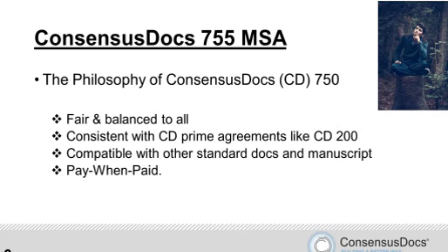And as a standard document, like the 750 and the 751 short form, the document is pay when paid, and that is the standard which we have come to agreement and consensus. I know that there's different views on that type of provision. I know a lot of people feel like there's a pay if paid provision, and that's a tough one, right? And so the bottom line is this is the best practice standard that we put in and publish in our document. So people feel differently.